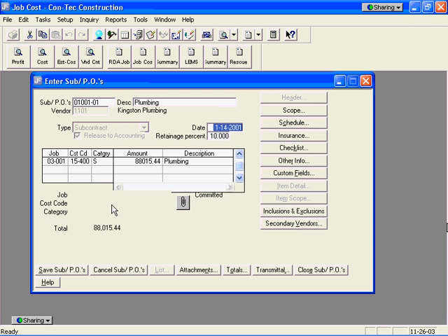And from here, we can control the subcontract from reporting and job costs. As soon as a subcontract is created, a commitment cost is posted to job costs. They can be tracked through accounts payable, warning you if you're about to overpay a contract, or if you're about to overpay a budget on a line item for a contract, giving you control over your cash flow. Also for compliance items like certified payroll received, lien release received, items you may want to track and control and administer before you send the payment out.